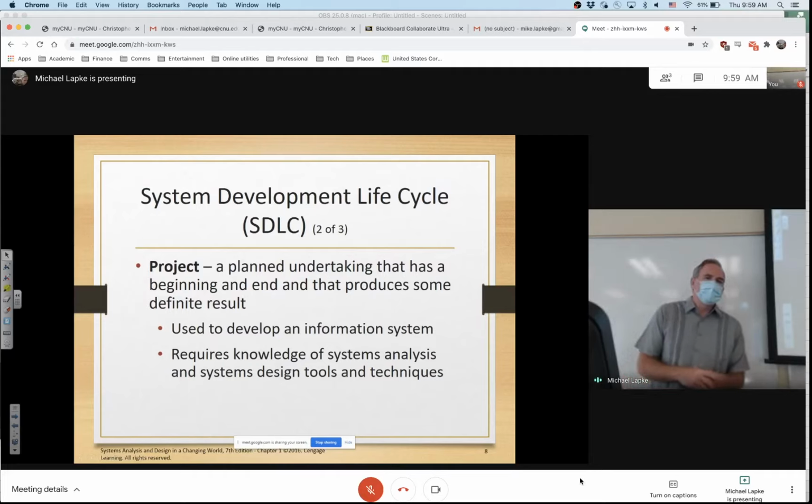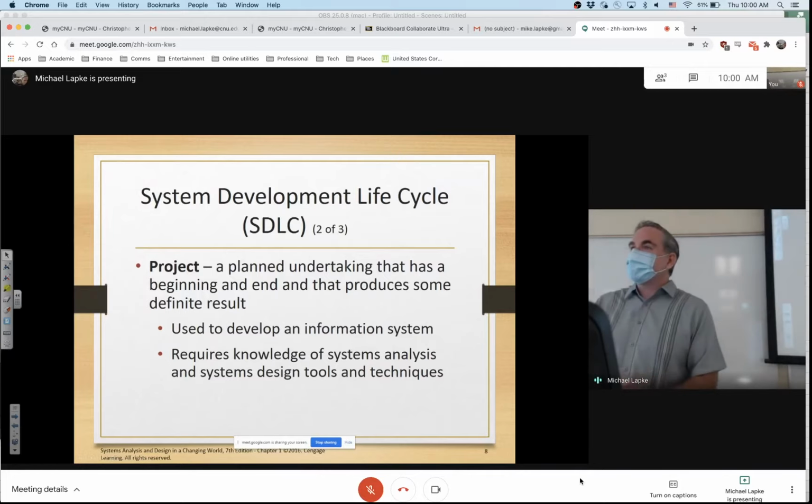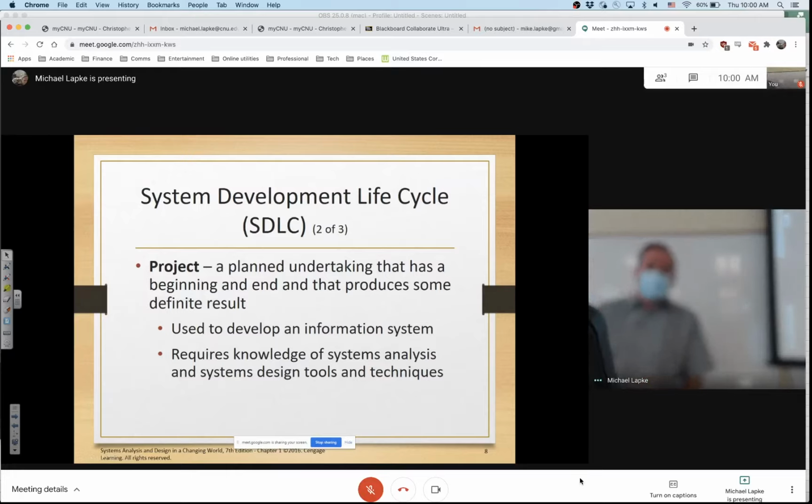In other words, be careful about something called BPR, which is business process reengineering, where you're changing everything about the business. You may never finish. You may end up as one of those statistics of the 65% of failures, because you let the scope get too large. You don't understand there needs to be an endpoint to this, and it's not just a forever ongoing process. It can be a very tempting thing, because you see a lot of possibility in the development.